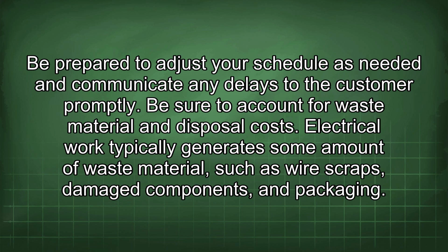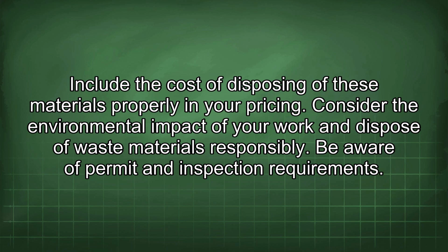Be sure to account for waste material and disposal costs. Electrical work typically generates some amount of waste material, such as wire scraps, damaged components, and packaging. Include the cost of disposing of these materials properly in your pricing. Consider the environmental impact of your work and dispose of waste materials responsibly.